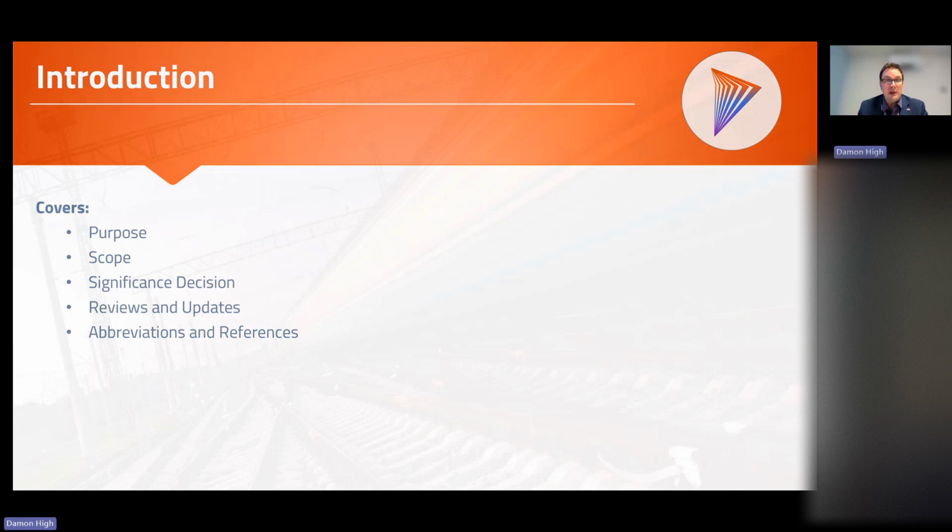But also it could be that if there's a change of scope in terms of the project that we're delivering, whether scope gets taken away or scope gets added, that might trigger us to have a review of our safety plan before we wait until we get to the end of the particular phase of the life cycle. So it's good to just make clear in this particular section that we understand what it is we're going to do as a project in terms of making sure that we keep this information up to date as we go through.